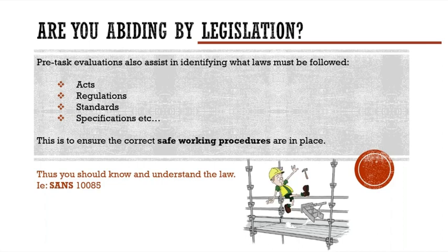Now, many times these are things that are unforeseen. Not to say that we don't know that we need a scaffold to get up onto the roof, but a lot of times we have on site people thinking they can get onto the roof, a 4 or 5 meter roof, with a ladder and not wear a harness, not have full protection, not be trained in working at heights. All of this is poor planning, poor preparation, and because they have not done an evaluation of the site. We know that you know how to perform your tasks. The evaluation is there to ensure that the environment you are putting yourself into is specific to the safety standards that are needed, as well as effective in saving your life or the life of your employees while on site.